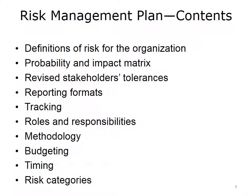The risk management plan outlines how risk occurs during the project and how it is managed. Generally speaking, it classifies or categorizes risk, outlines the response, and describes who or which role is responsible for implementing the response. It also includes: your organization's definition of risk; definitions of risk probability and impact; revised stakeholder tolerances; reporting formats; information about how you will be tracking the risks; the roles and responsibilities of individuals and organizations involved in the risk management activity; your methodology; information on budgeting and timing; and appropriate risk categories. Some information in this risk management plan, such as assignment of roles, responsibilities, and risk categories, will be input during the identify risks process.